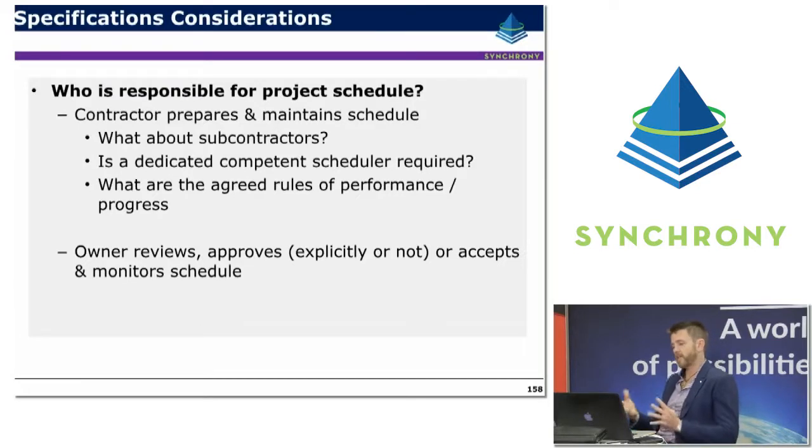It's really handy within the specification or the requirements to also identify who is responsible for the project schedule. So the contractor prepares and maintains the schedule. What about their subcontractors? Is there a requirement to flow down particular reporting requirements to subcontractors, and understanding and specifying that as much as possible?